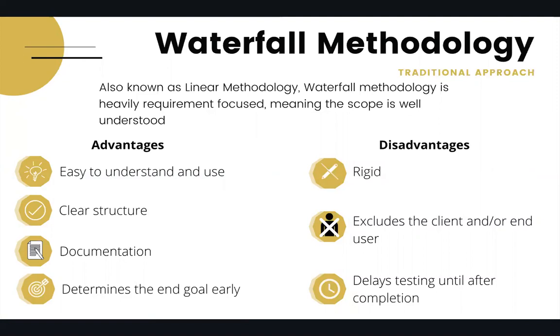The waterfall method is divided into discrete stages, and it starts by collecting and analyzing requirements, and then designing the solutions as well as implementing and fixing issues, if any. And each stage has a start to finish dependency.